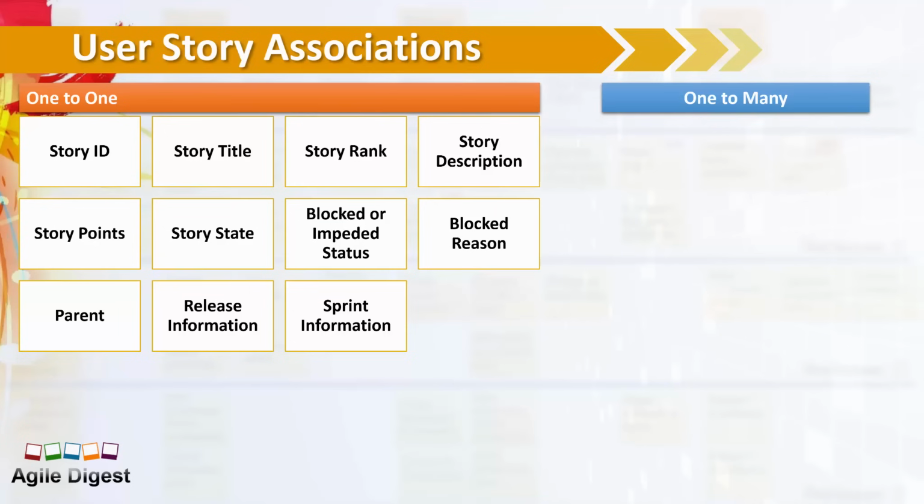So what happens is, if you have committed for one sprint and you didn't complete it, you move it forward to the backlog, and then plan it again for another sprint. That story shows both the sprint where it was involved and planned for development. We also have an owner. So there are two things: one is owner, one is assigned to.